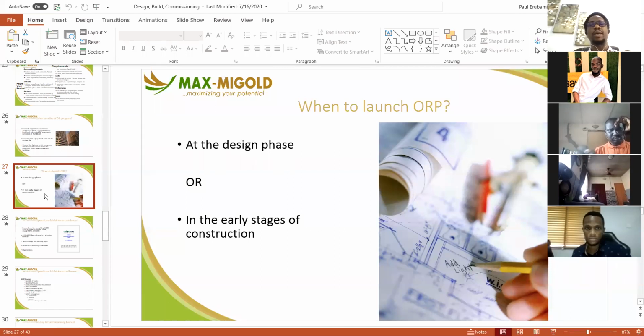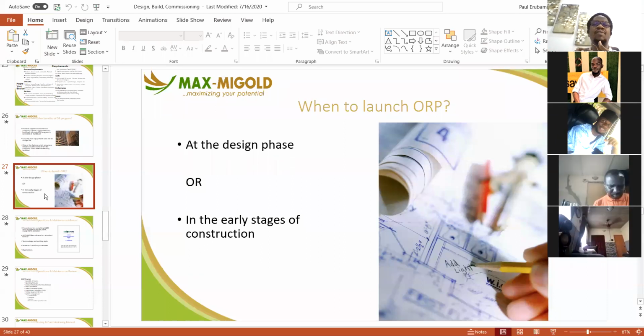So the planning stage is where you have basic agreements on what the brief for that project should look like. And that brief should include a fourth dimension. Let me tell you why the fourth dimension is very important. When projects are going to be initiated, there are usually constraints to be considered. We have this amount, so budgetary constraint, we must develop this project in this 1 billion, nothing more. We must develop it at this time, make sure it is done within 1 year. They put that as an objective. They also have the objective of ensuring that the scope to be covered, in terms of how many square meters and the grade of materials, is also captured inside that.